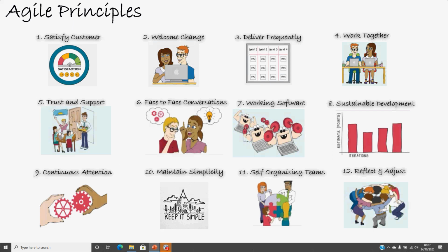But over here in Agile, since you have broken the project into small sprints and you are capturing lessons after every sprint, you did sprint one, captured those lessons from the retrospective, and implemented them in the next sprint. Then in the next sprint again you captured lessons, and you implement them in sprint 3, and so on and so forth. So this is how frequent reflection benefits us in moving further in Agile.